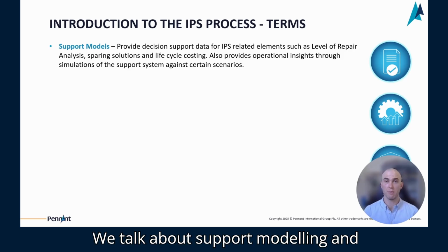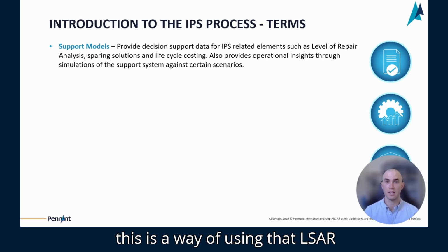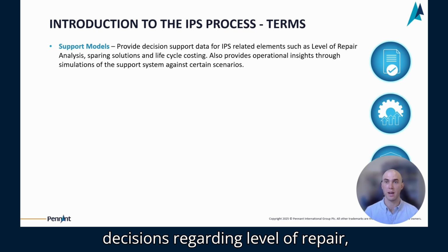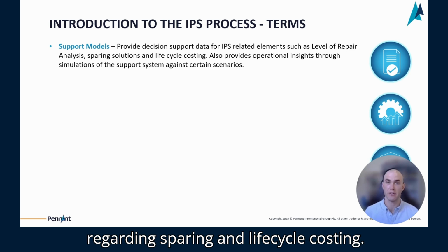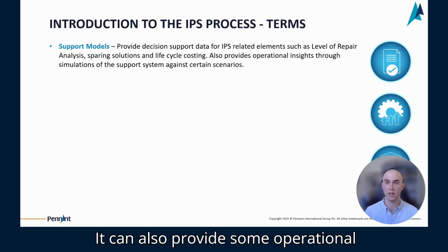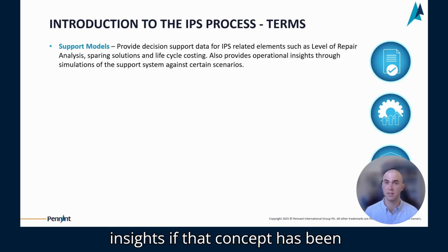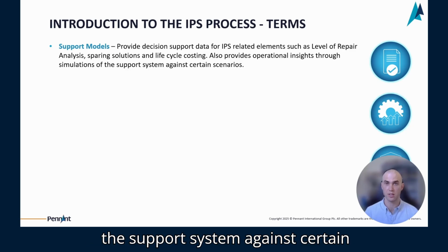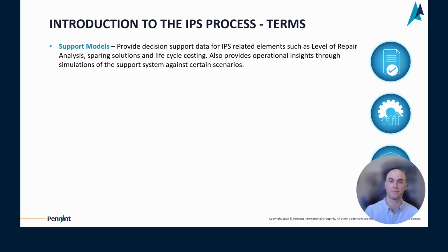We talk about support modelling, and this is a way of using that LSAR data to help drive some decisions regarding level of repair, regarding sparing and lifecycle costing. It can also provide some operational insights if that concept has been determined yet through simulations of the support system against certain scenarios.